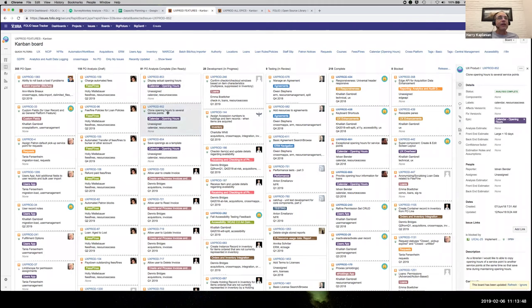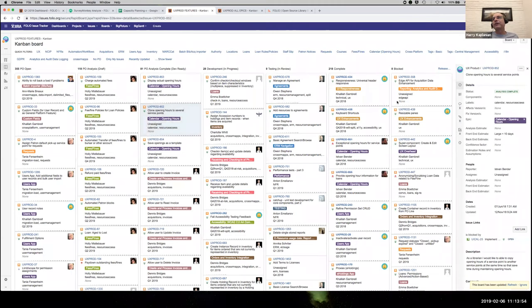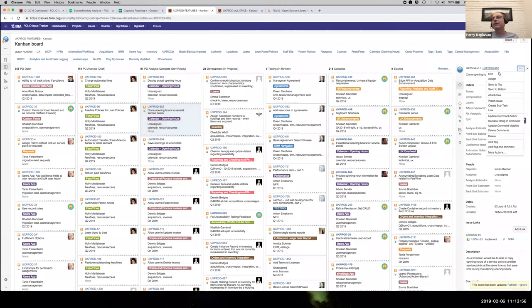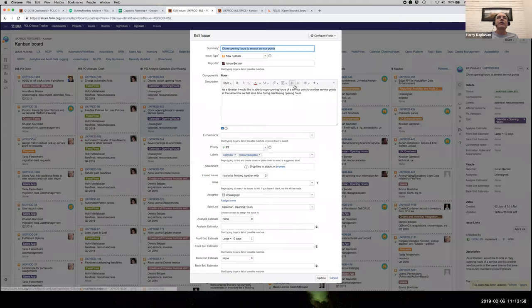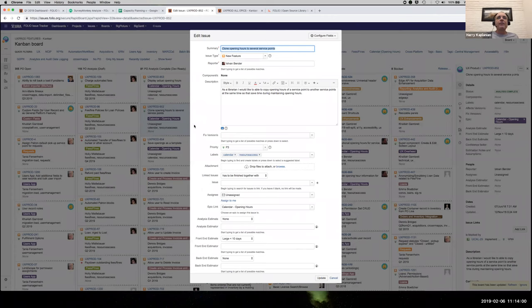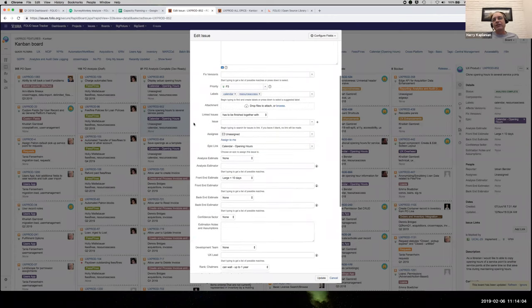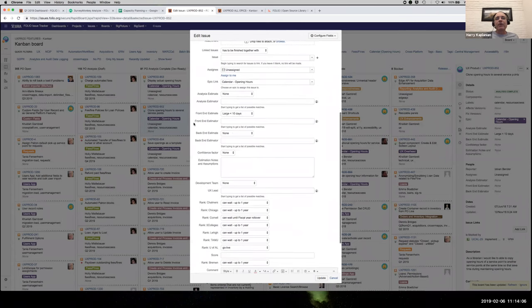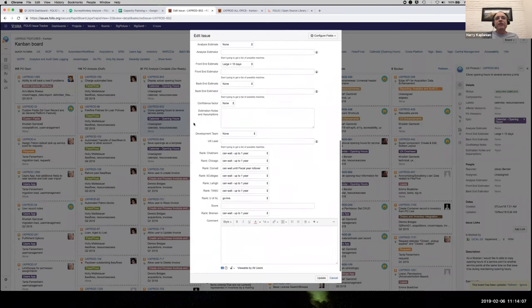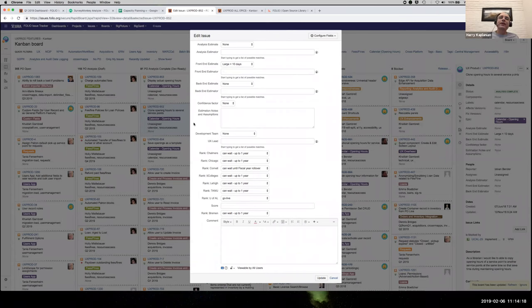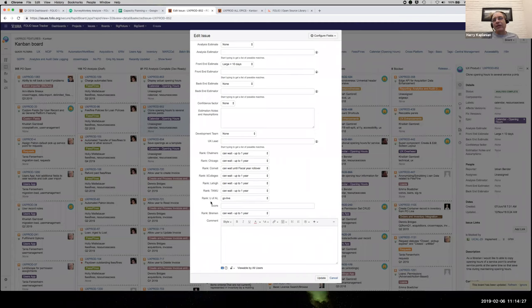If we take a look at this feature, let me edit this so you can see more detail here. This is very high level. Many of these are still under analysis. But one of the things we do here is since we all work out of JIRA, this is how we actually track the different features and stories that are being built by the development teams. We actually have the early adopter libraries get involved as part of this process as well. And so you can see here, for example, the rank by the different early adopter libraries that are heavily involved in this project.